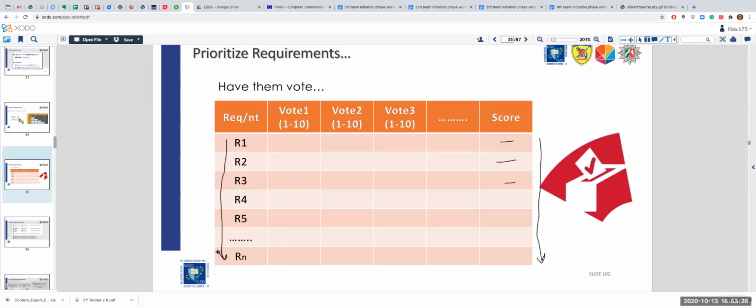So most probably the boss is going to say, you know something, Elias? Budget. We cannot exceed the budget by a single penny. So what do I do? Since these are prioritized, I'm going to go, how many? I have $10. This one costs 2. This one costs 5. This one costs 1. This one costs 1 as well, and so on and so forth.